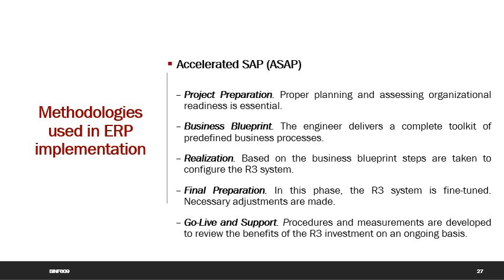Needed adjustments are made in order to prepare the system and the business for production startup. Final systems tests are conducted and end-user training is completed. Initial audit procedures are developed.